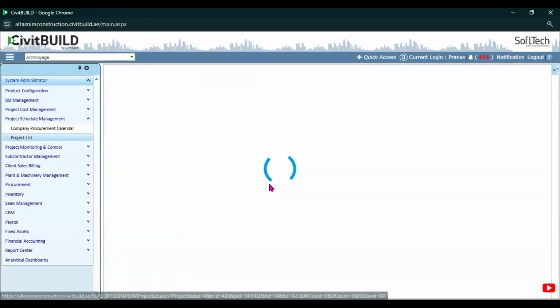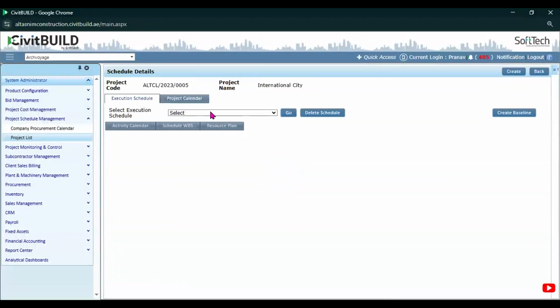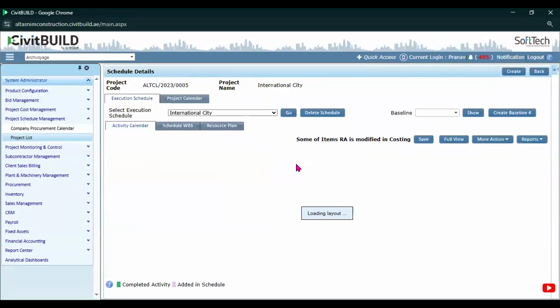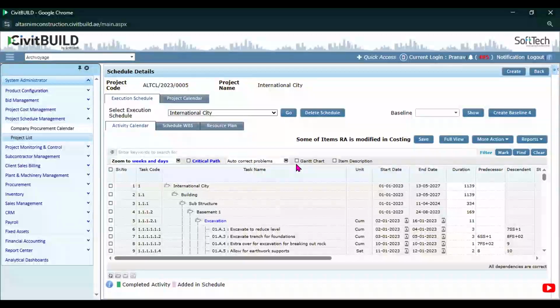In project schedule management, the entire WBS prepared in the previous step can be used, and the scheduling is prepared based on that particular WBS. Or the user can choose to prepare an individual scheduling WBS and start scheduling, or defining the line items, with reference to the WBS. All of your activity items defined in the previous step are available here to do the scheduling.